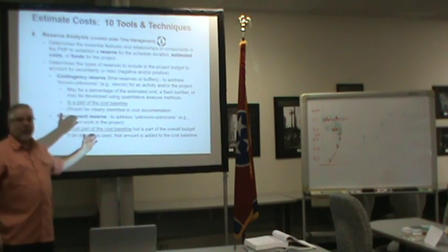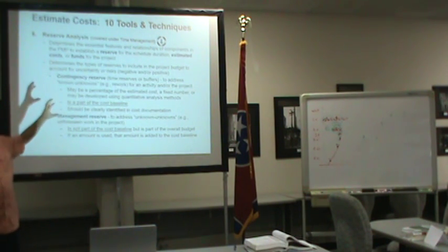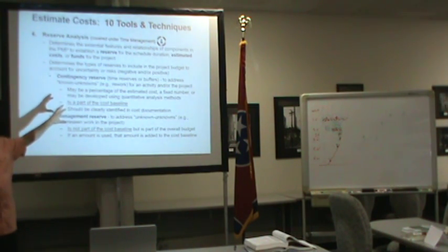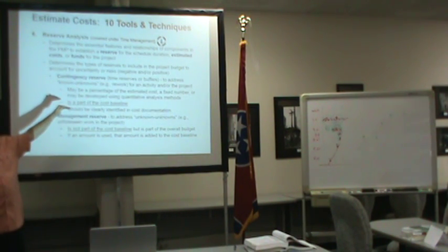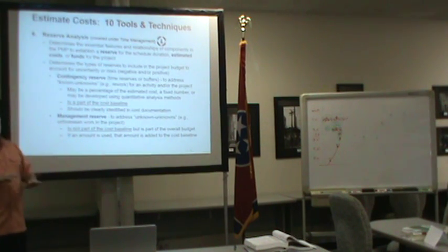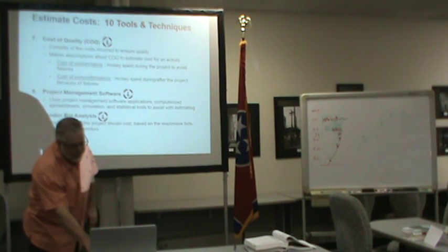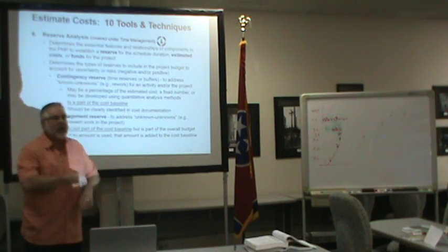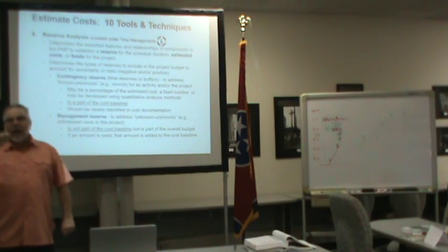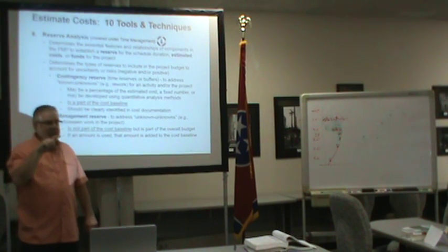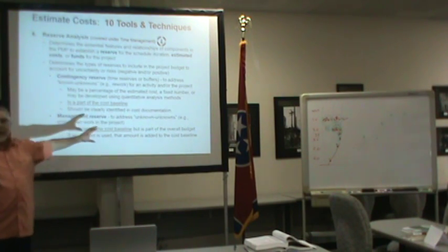So understanding those two reserves is important to you. Understand that this is a part of the cost baseline. This is not a part of the cost baseline. And, I will have to look that up. I don't think I've got it here. But there's a good graphic in the PMBOK that shows you how you build up the cost baseline, and then on top of that are these other dollars that are management reserve.